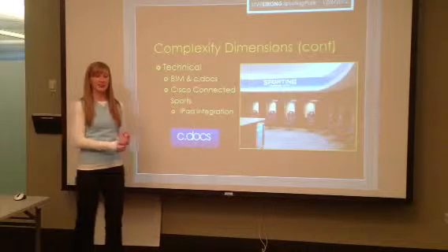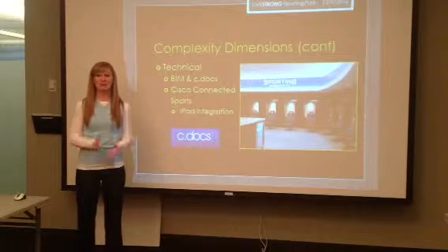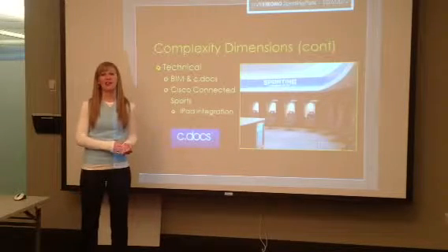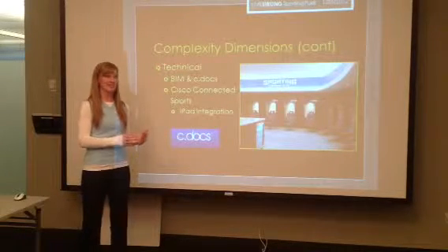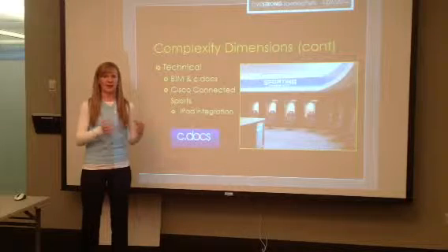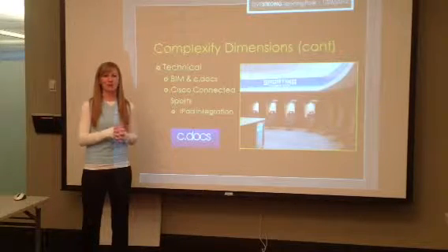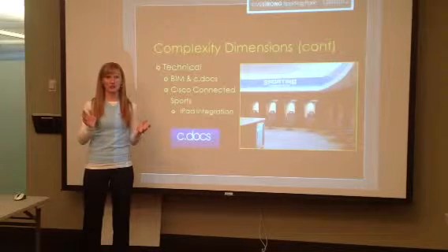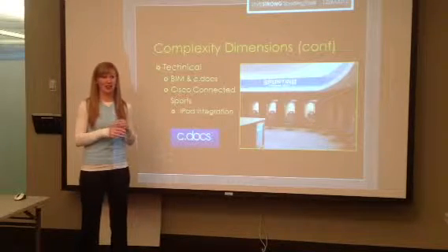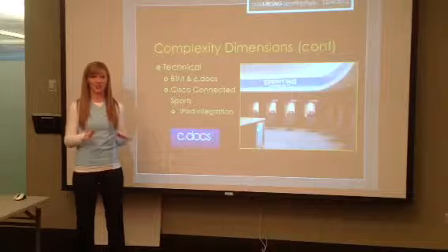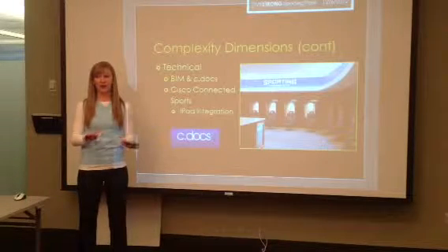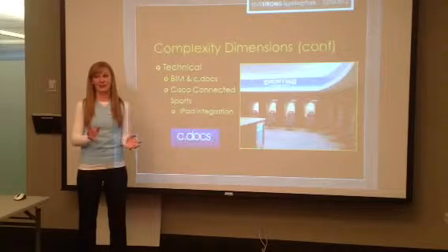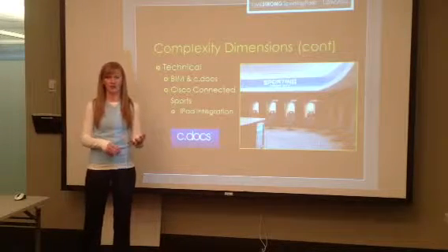Moving on to the technical piece, BIM played a key role for us in this project, particularly in the precast portion, because we had precast stairs and things that went into the stadium. So we were working on that from the beginning. Once we had done all the precast clash detections and made everything okay, there were only two minor things we had to take care of in the BIM model, which really helped out in the field.